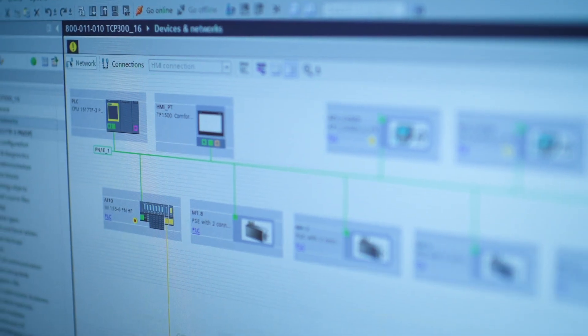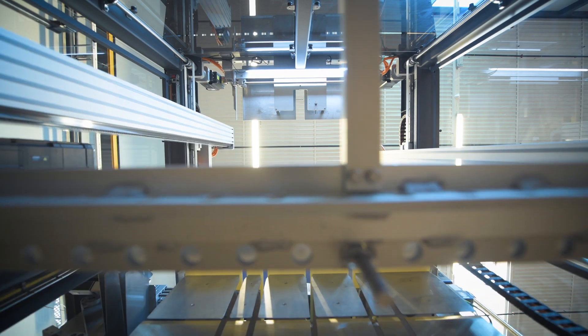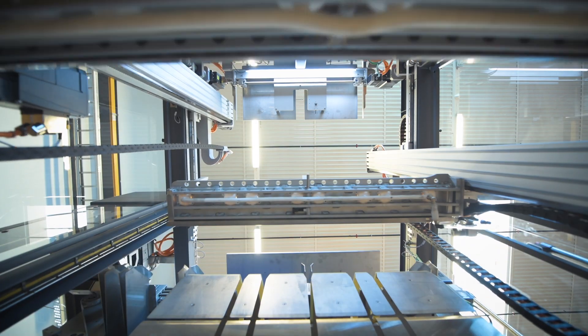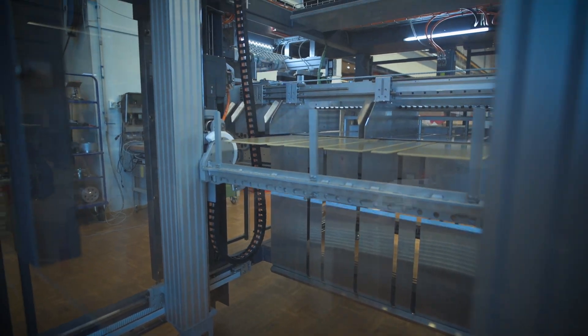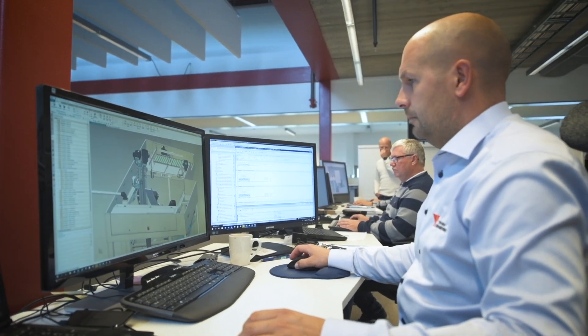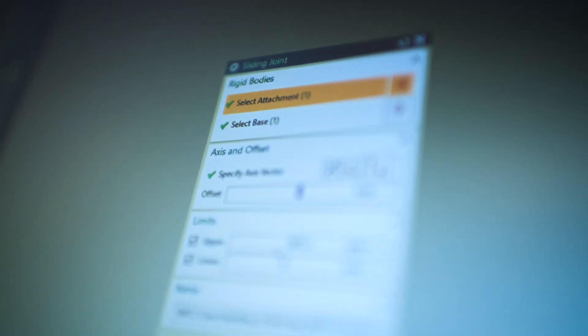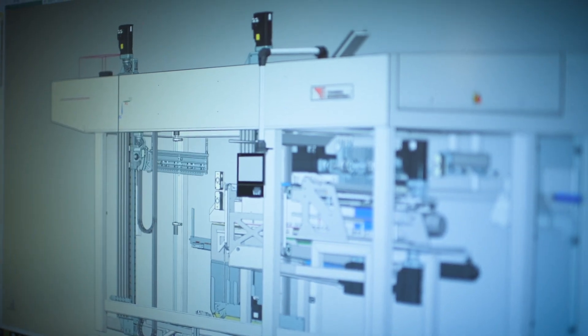The main advantages we received on this machine with virtual commissioning is especially on the kinematics setup of this machine. Because of having two kinematics systems work in one shared space, we could test out the complete system in a virtual environment. And of course we had some virtual crashes, which saved us a lot of money.